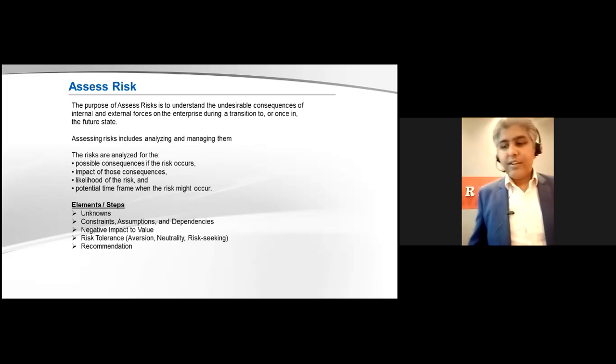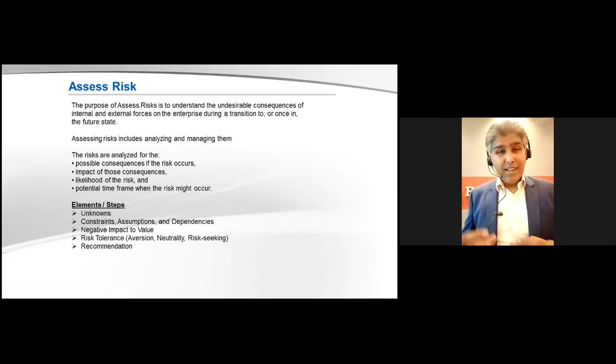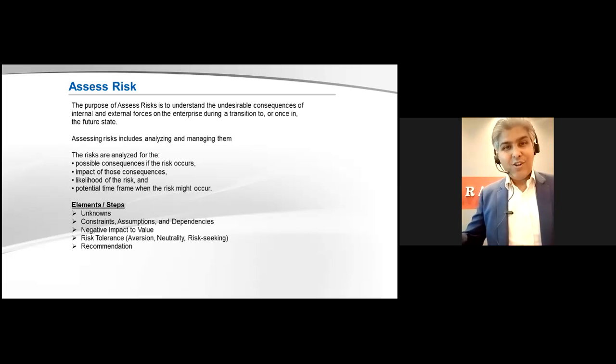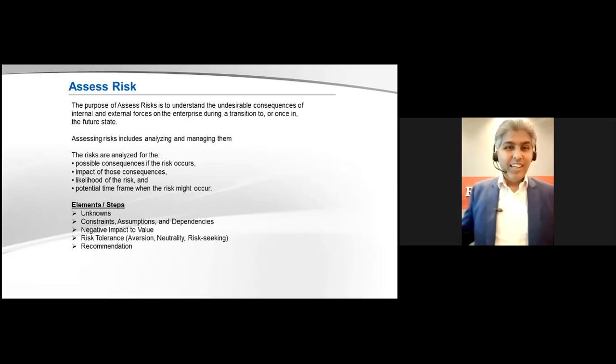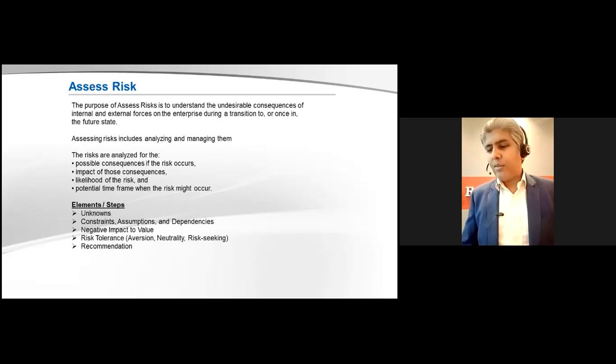You have to understand that risk can also come from internal and external parties. So, for example, if you are outsourcing the project, the financial well-being of your vendors is also important, especially for larger projects that go one year or above. Especially in the Corona period, a lot of organizations that stopped their operations in February were not able to reopen their businesses in June. So that could also have an impact. So you have to consider the financial well-being of your vendors.